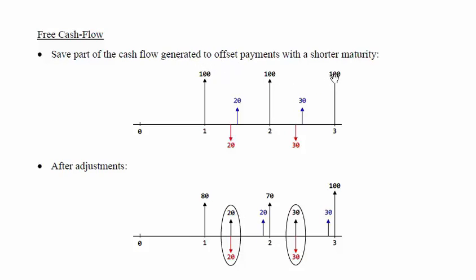What we have here is the predictions for 3 operating cash flows for year 1, 2, and 3. They are equal for simplicity. Okay. And what we have here in blue and red are cash flows that, in fact, they cancel. So the blue is a positive cash flow and the red is a negative cash flow. And what we intend to represent with this is that we may have to pay before we receive. So the payment period may be less than the receiving period on average.